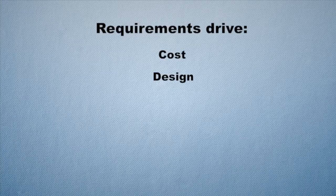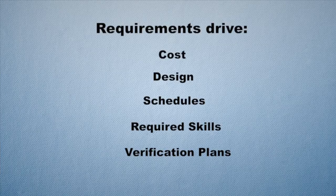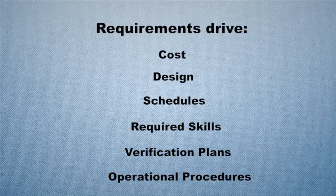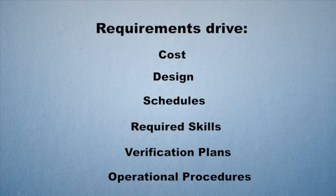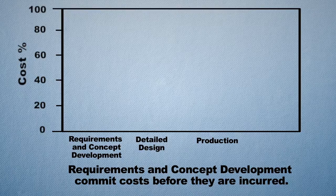Requirements in the end will drive the cost, the design, the schedules, the required human skills to build the system, the verification plans, and the operational procedures. That's why it's so critical to clearly define all the requirements before you go too far in your system design. Let's talk about how requirements drive cost for your development of a mission.